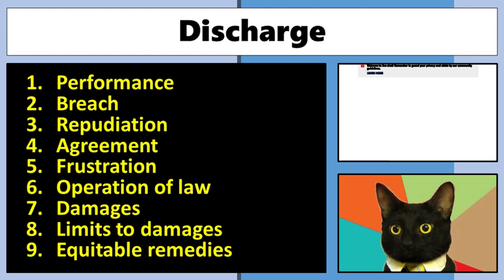Contractual obligations can actually come to an end in many situations through agreement too. That's actually pretty simple. I don't talk about that too much. If both sides both agree from a certain point in time they don't want to do this contract anymore, then that's usually fine. A doctrine of frustration. Frustration here is again used as a technical term to describe situations where an event has happened after formation that neither side could have thought about, contemplated, that completely undermines the contract. And there's some special rules for what happens next.